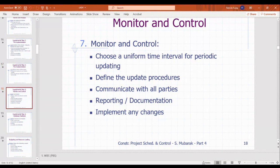The baseline schedule can be what the assumption is, but maybe you have a need to expedite certain steps to make up for a missed milestone on a different trade or something like that. That baseline schedule is going to be the baseline when you sign that contract, or sometimes it's from contract date, sometimes it's from construction start date. Even though you're using that schedule now as a tool to track, monitor and control, that baseline schedule is a contract document.